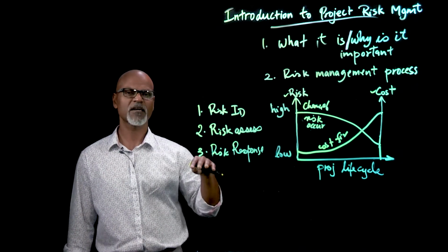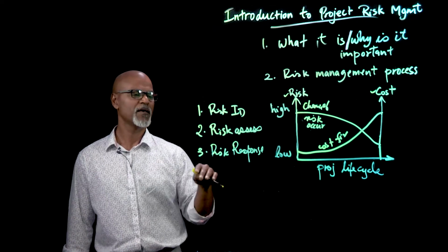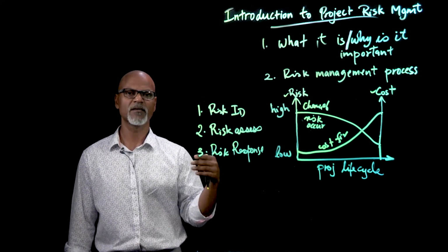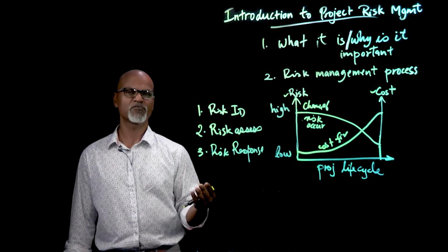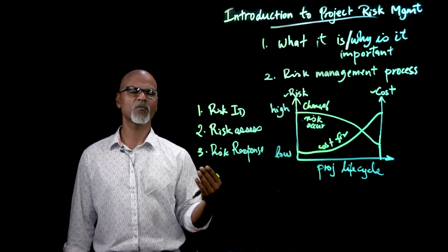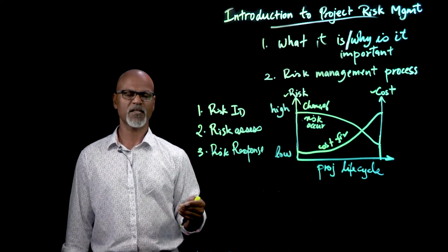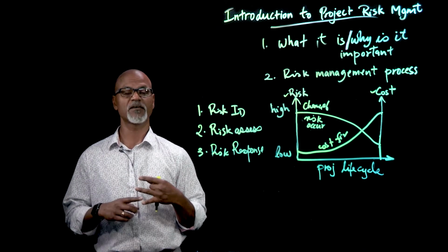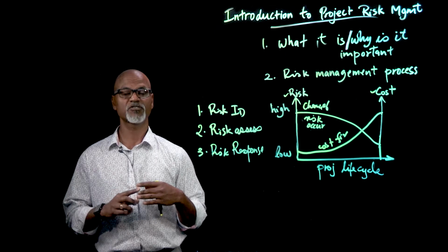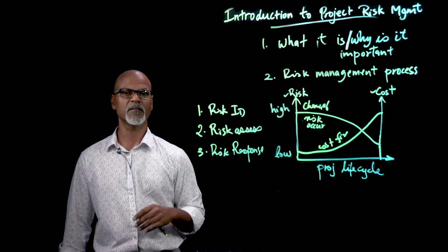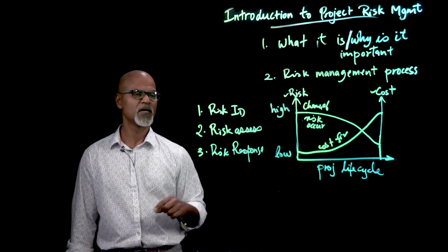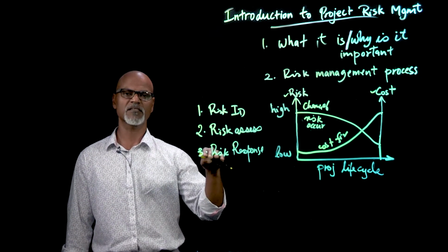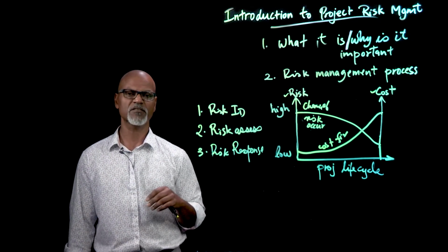Once you've prioritized your risk in terms of severity and likelihood, the next thing is to develop responses to those risks. Obviously you'd want to focus on the risks with high severity and high likelihood first. When you're running, you look at what steps you can take to mitigate the risk of getting injured. Some of those steps could be to make sure that you're getting your proper nutrition, following your training program, seeing your doctor regularly, warming up and cooling down, stretching, and so on. So you've identified your risks, you've prioritized your list of risks,